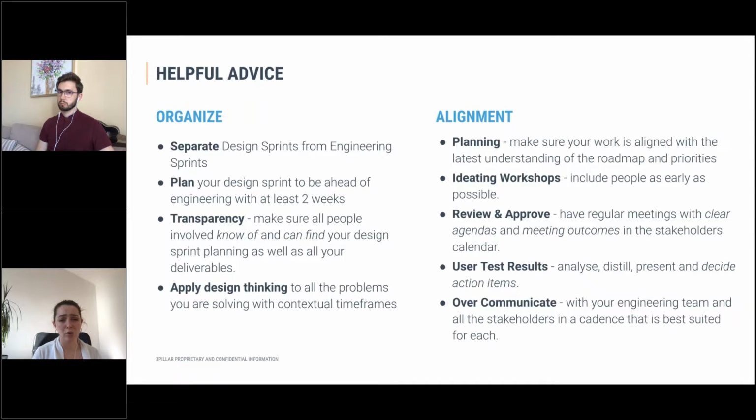Apply design thinking to all of the problems you're solving with contextual timeframes in mind. So the small task could take a day or two. The known problem could span anywhere between 2, 8, even more weeks depending on the workload you already have. And then the big and complex ones could be broken down into epics and then into smaller tasks, and then it could populate months of roadmap.